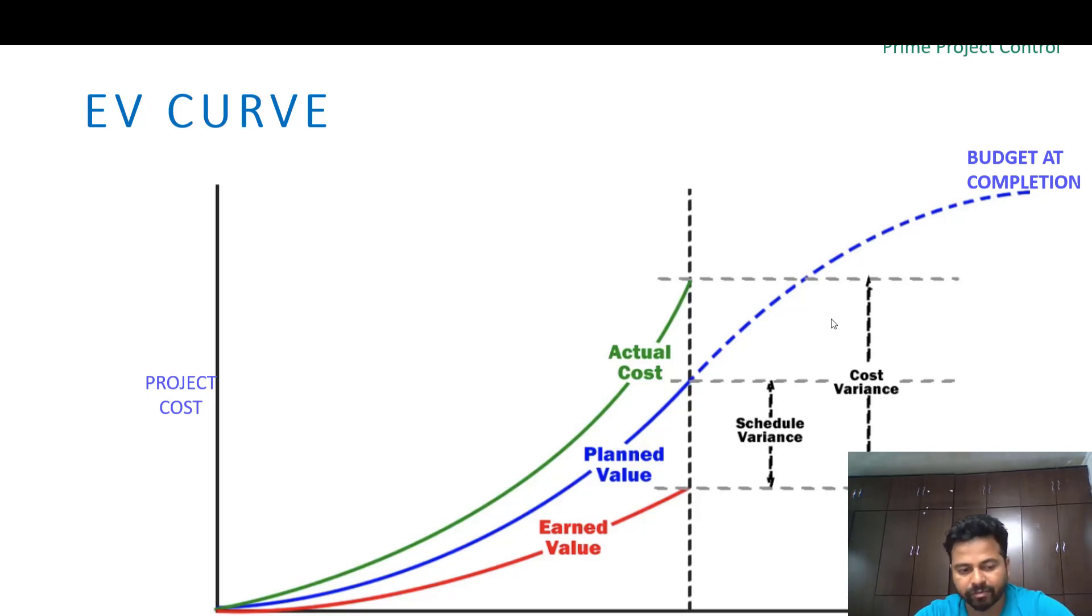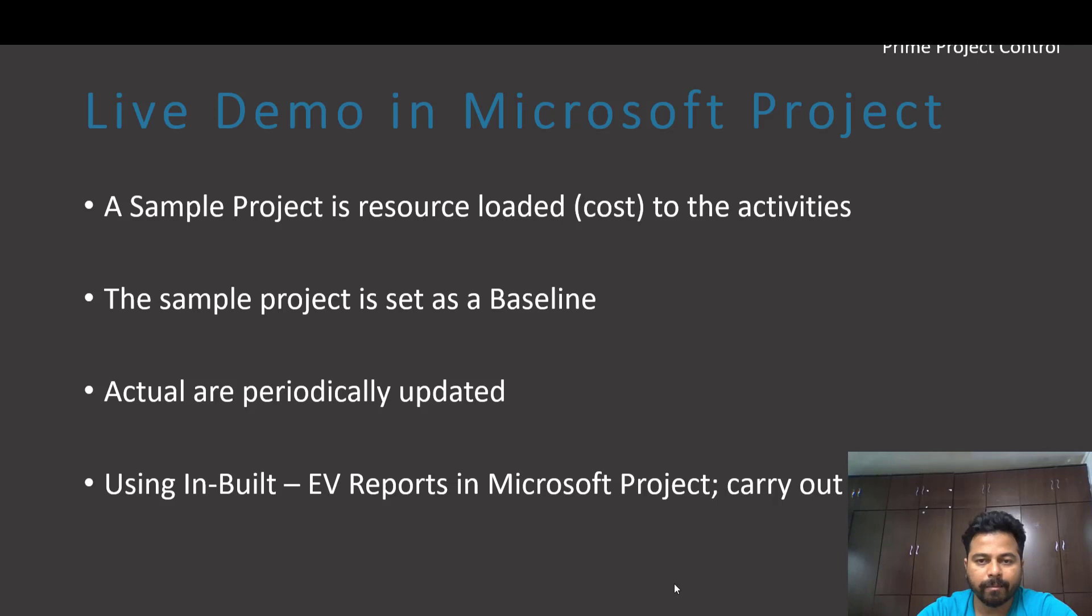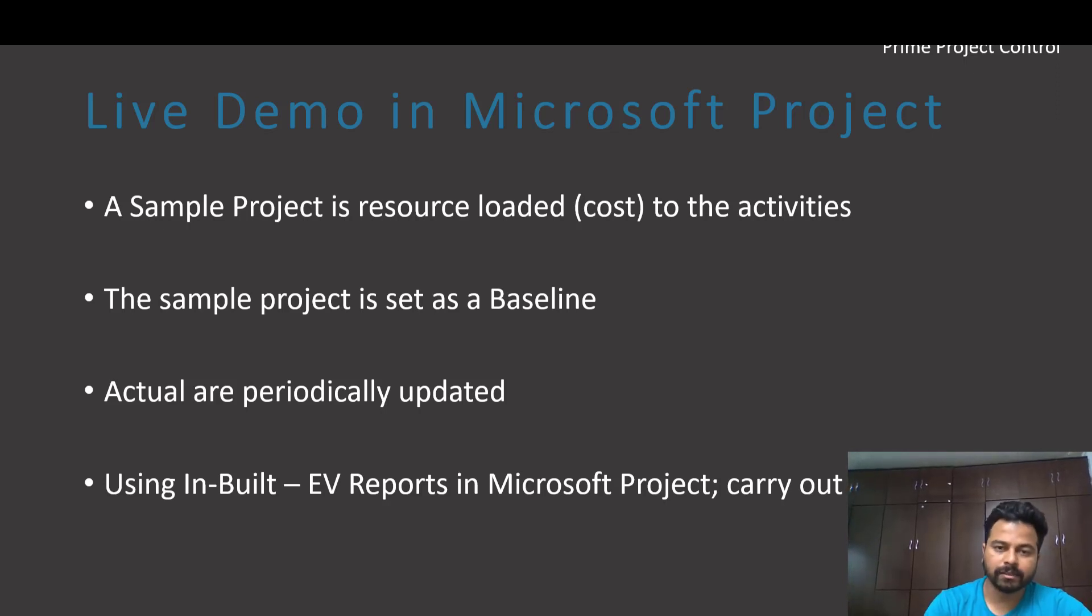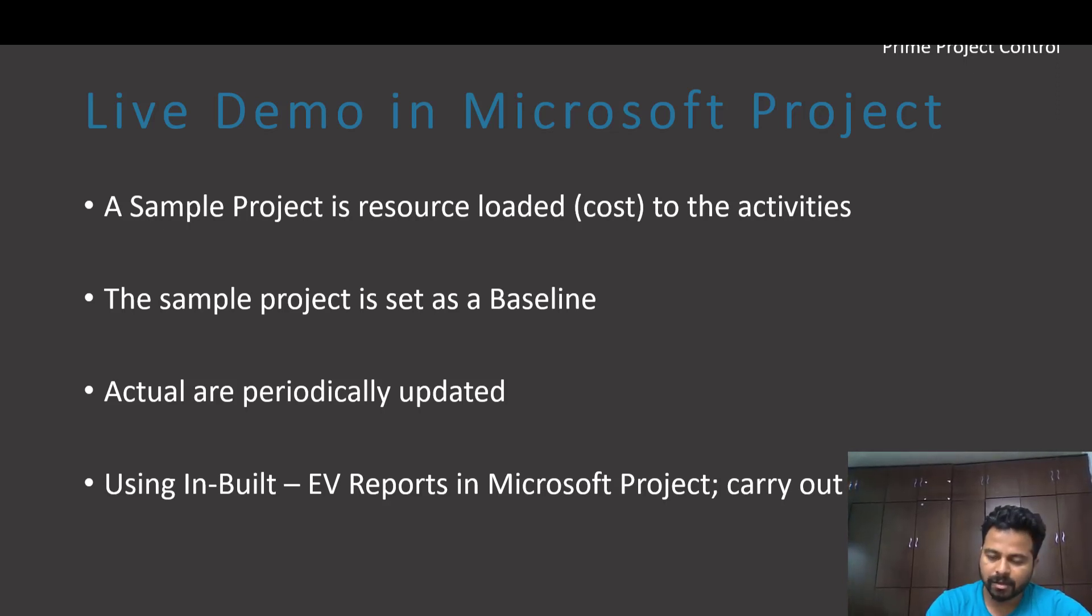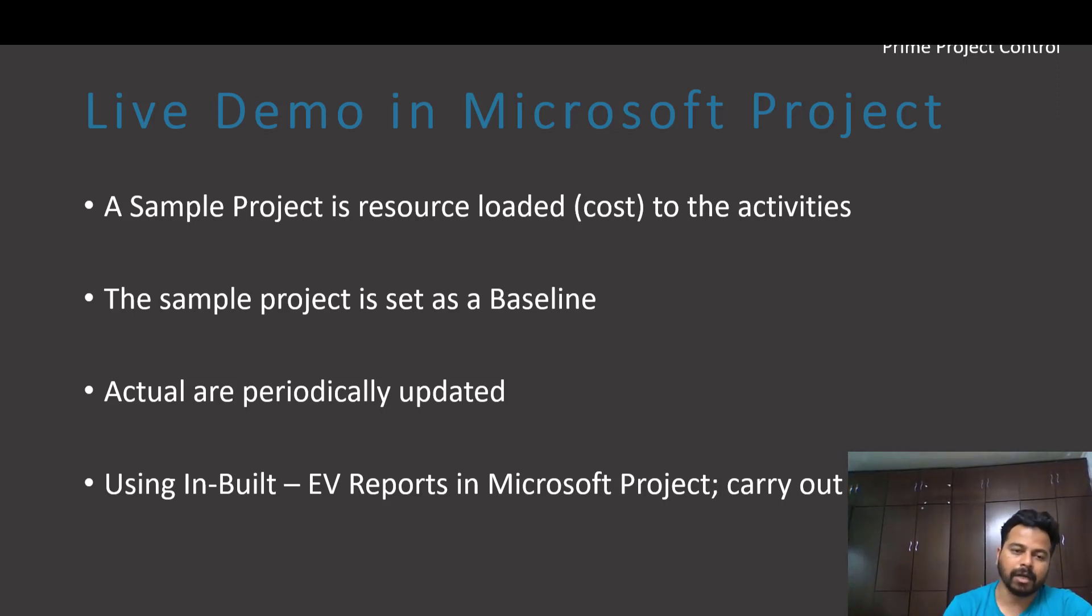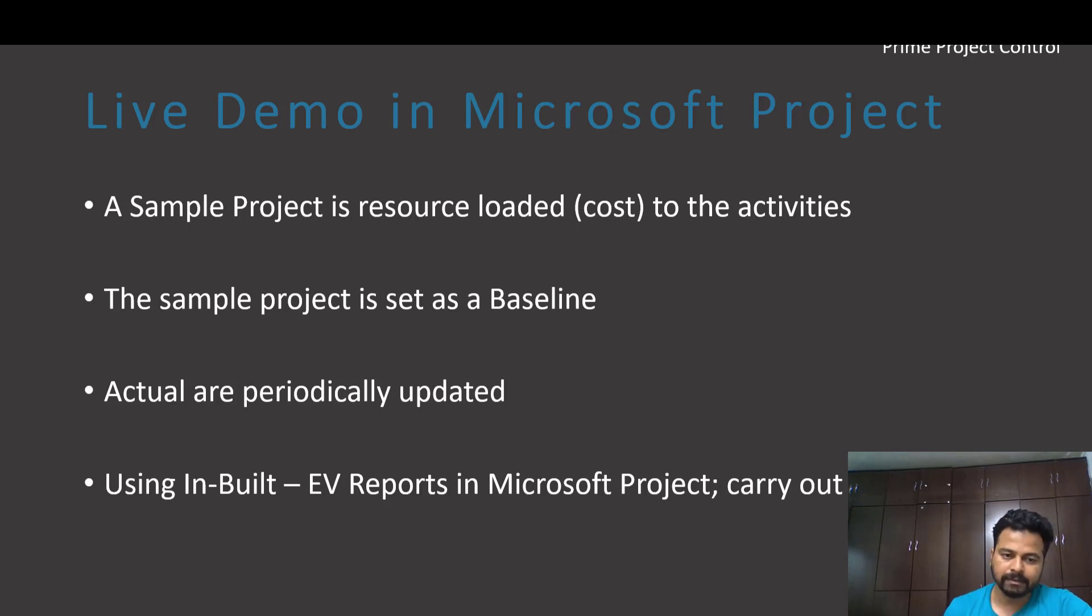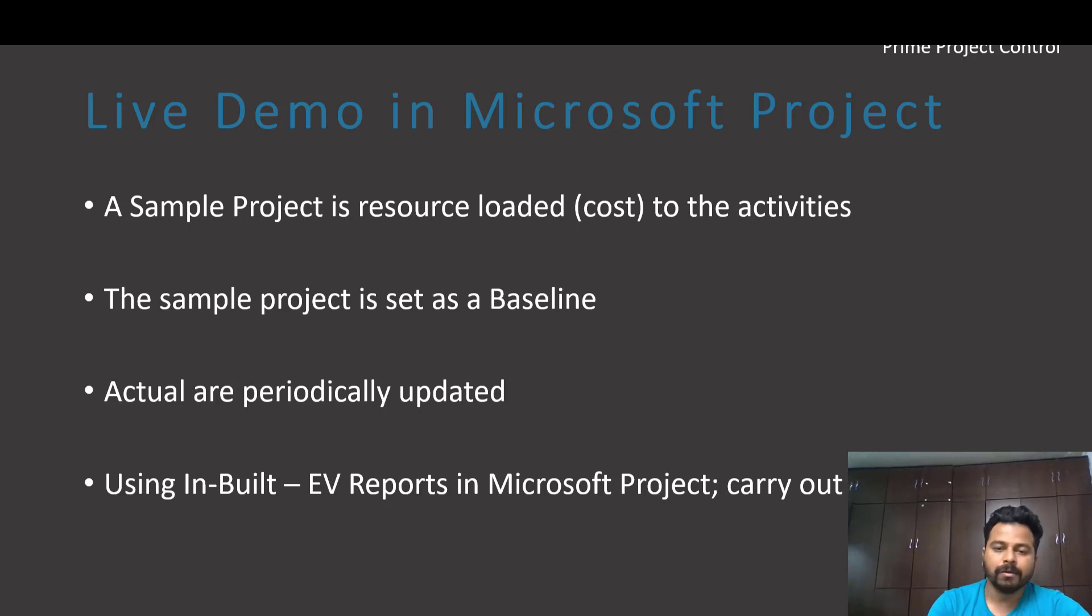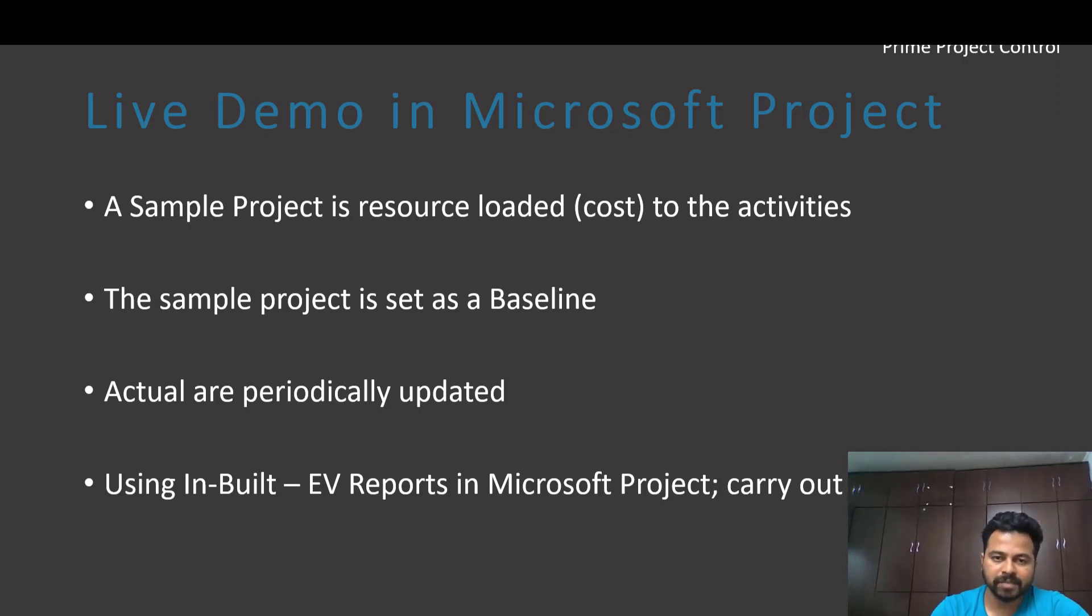Let's go to the demonstration in Microsoft Project. Before that, what we are going to do is in a live demo we will take a sample project which will be resource loaded to the activities. We will take a look at this and set this project as a baseline, then we will update the actuals periodically. Using the inbuilt function we will generate an EV report so that you could understand the procedure and how to do it in Microsoft Project.